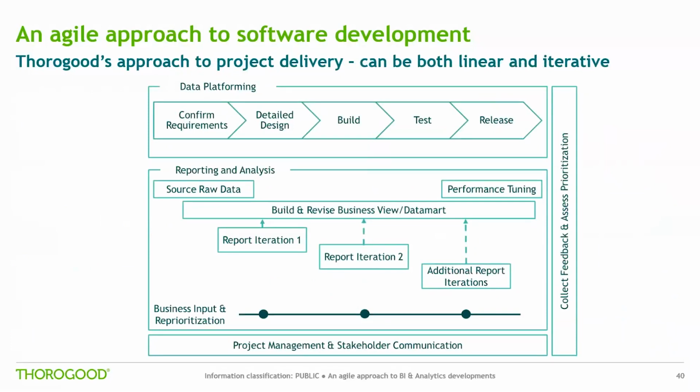For example, data platforming is suitable to a more linear approach to implementation because the requirements are more likely to be well-defined and documented and not using unproven or unfamiliar technology. The reporting and analysis requirements are likely to be less well understood and would benefit from a more iterative approach to development, taking advantage of prototyping and regular user feedback to refine data presentation, structures and calculations. It may therefore be beneficial to take one approach for the better known requirements and a different approach for the less well known requirements, flexing the methodology to provide additional business focus and agility in areas that would experience the